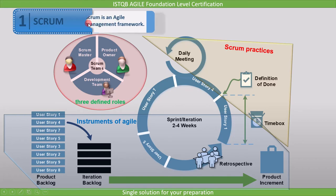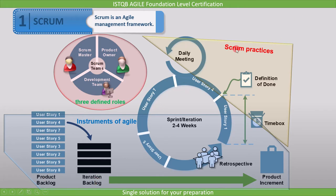What is Scrum? Scrum is an agile management framework, and the framework is made up of instruments and practices, and three roles are defined in it. Instruments of agile are Sprint, Product Increment, Product Backlog, and Sprint Backlog. Scrum practices are Definition of Done, Timeboxing, and Transparency. The three defined roles are Scrum Master, Product Owner, and Development Team.